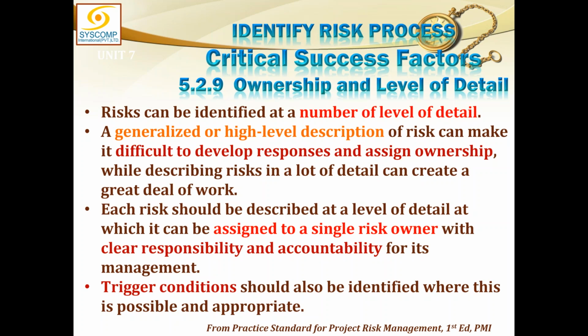Trigger conditions should also be identified where this is possible and appropriate. So, trigger conditions are when this risk is about to come or it becomes dangerous for your environment, what is the trigger for that? And to have a trigger, you must have a sensor also. Who and how will it be sensed that the risk is nearing? And when the risk is nearing, how would I know that the risk is nearing? This is the trigger. Maybe somebody tells me, somebody rings a bell or something like that. That would be a trigger condition.